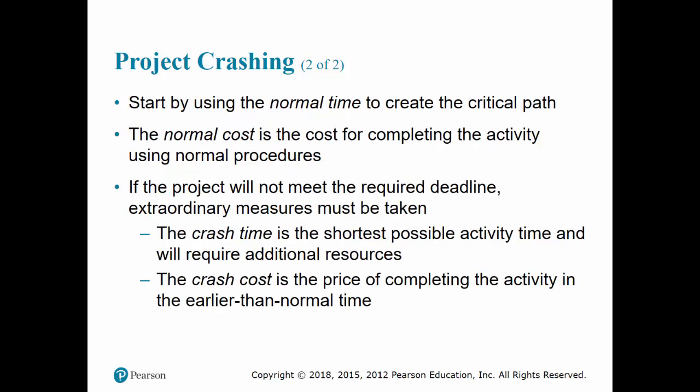This is the approach. This kind of modeling is called CPM modeling, critical path method modeling. Remember, this is for projects where activity times are deterministic. The activities are so well understood that you can not only precisely estimate how long it will take under normal conditions and how much it will cost, but also by spending what amount of money you will be able to complete that activity by how much faster. So all of that information is readily available to us.